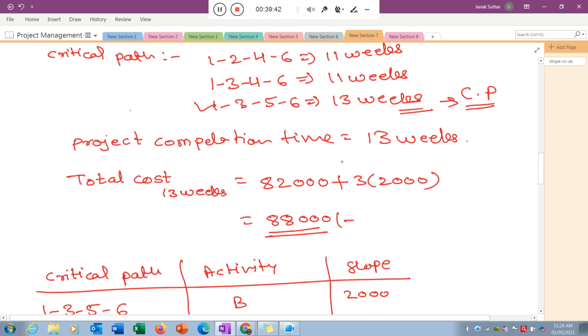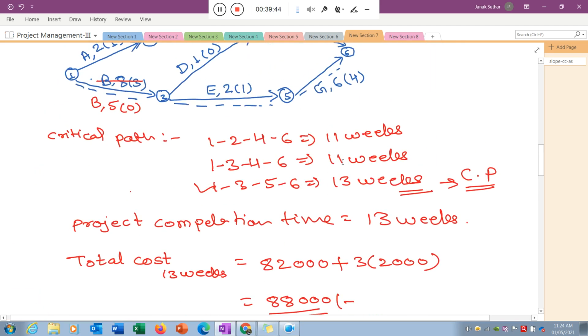You need to go to the network diagram again and check: can I reduce the activity 1 to 3? There were only 3 weeks of reduction available initially. Now you cannot reduce below 5. Below 5 you cannot reduce. So there is no feasibility of reducing activity 1 to 3. Suppose assume that there is some processing time.